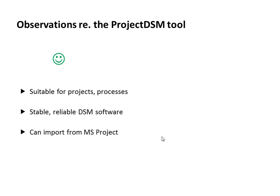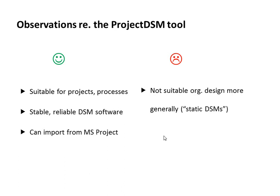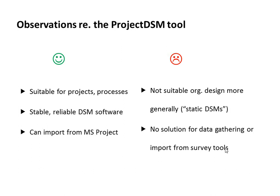Then there are also some limitations, unfortunately. One is that it's not suitable currently for organization design more generally. And this has to do with the algorithm being used here, which is only suitable for work processes where you have sequential elements. So it's not suitable for what is called static DSMs or team-based DSMs, where the elements are organizational units, for example. And unfortunately, there's no solution for data gathering or input from survey tools. I mentioned that I have created a survey questionnaire to collect data about how people collaborate. And right now, the survey questionnaire works fine, but one has to input the data manually into the Project DSM tool. So this is, of course, very time consuming.